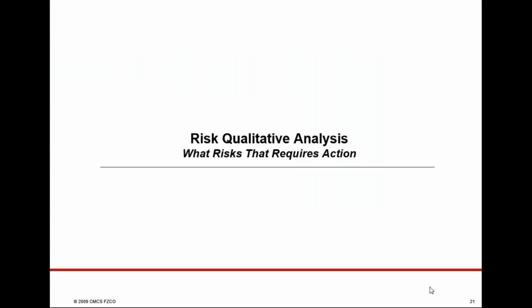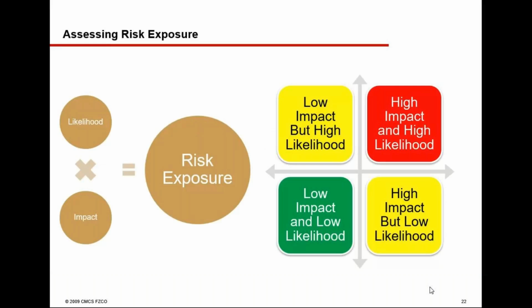Now, yes, we'll try to address that. What we do is we see the likelihood, we perceive that the risk may happen by 30%, that is your likelihood, and based on that probability, it will have an impact on time, cost, scope, quality, performance. We have created a scale, right?